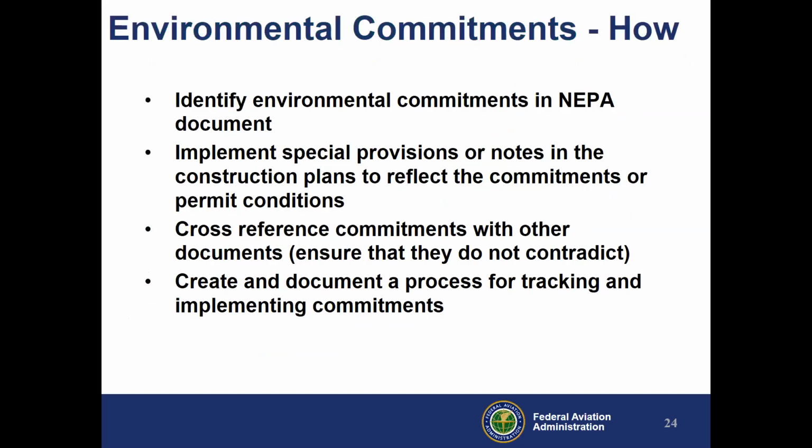So how do we do this? Any commitment that comes in, we're going to want to identify that in the document. And we typically show that in a very specialized section of the document because it makes it easier when we communicate to the designer at the end of NEPA, who will pick up and start including those commitments into the design plans.